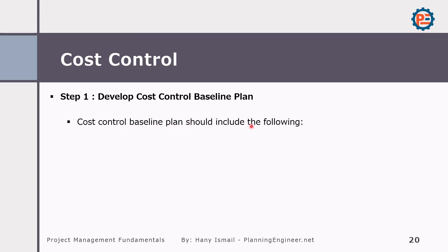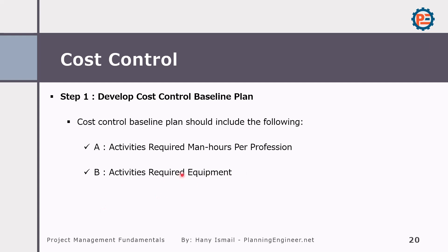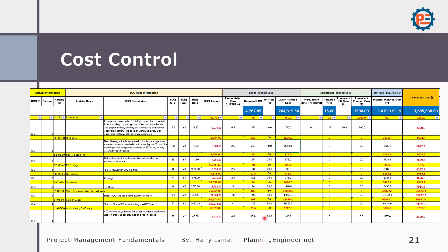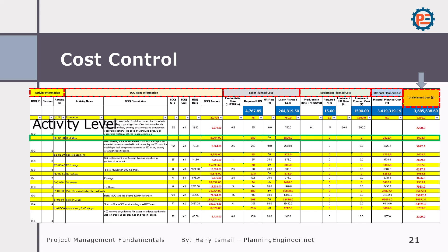The cost control baseline plan should include: the required man-hours per profession for each activity, equipment hours required, and materials needed. Here is a sample cost control sheet showing activity information, the BOQ item, labor planned cost, equipment planned cost, material planned cost, and finally the total planned cost — organized at both the activity level and BOQ item level.